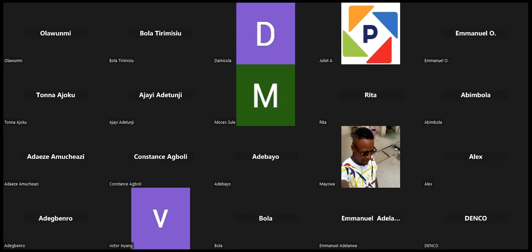That's what Adetunji and Bola are trying to explain to you. What determined him putting 5 instead of a 3 is that he has looked at this particular story and it is not just manual testing. It requires automation. And for you to do automation, you might need to write code or anything you need to do. You might need to write test cases. You might need to do your test plan, test strategy, depending on exactly what you want to do, before you pick what you need to do on it. So it's a bit more complex than the manual side of things.